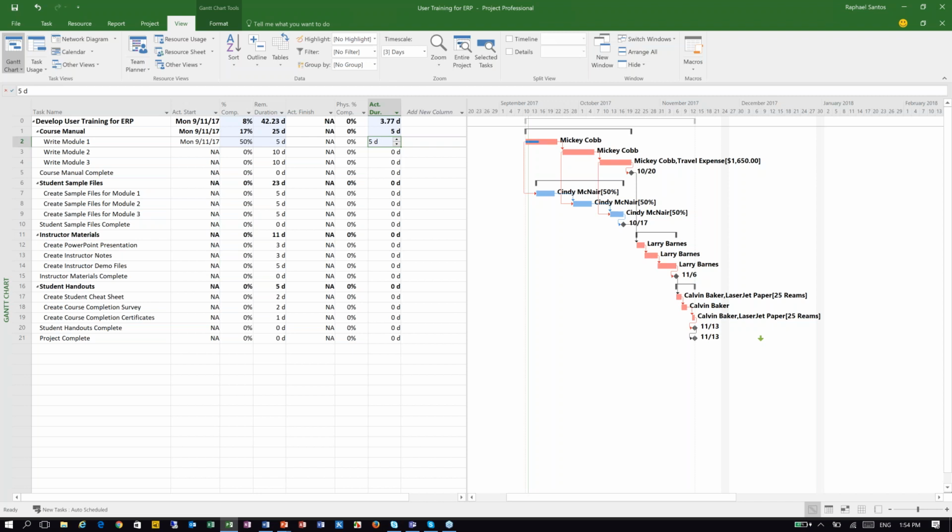Is this going to be 5 days, or are you going to need more time to get this task completed? And if she says yes, I need some more time, and as a duration metric she says I will still need 7 days. So I am 50% completed, but I will still need 7 days to get this task completed.